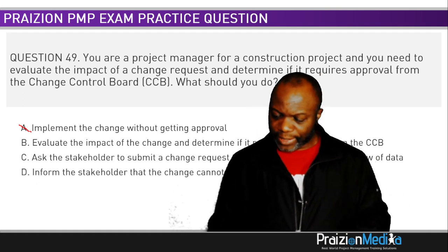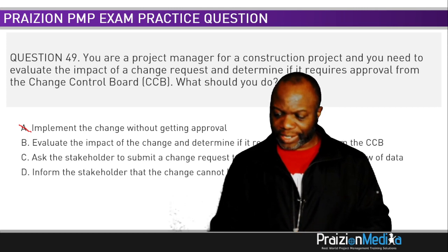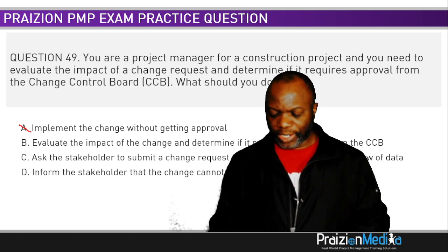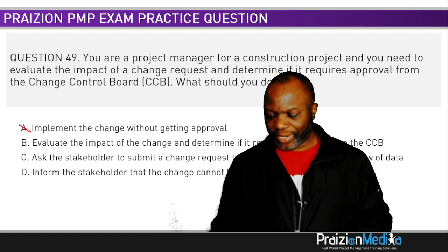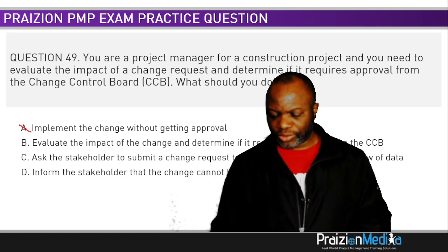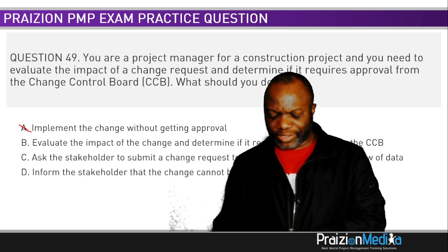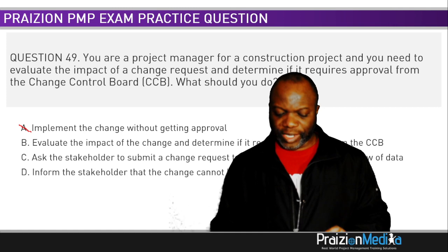See, it says, change control: once the project is baselined, change requests go through this process. As a general rule, each project's configuration management plan should define which project artifacts need to be placed under configuration control. You see, there's a lot of great content here. So the summary of it, my friends, is it depends. It says, whenever a change request